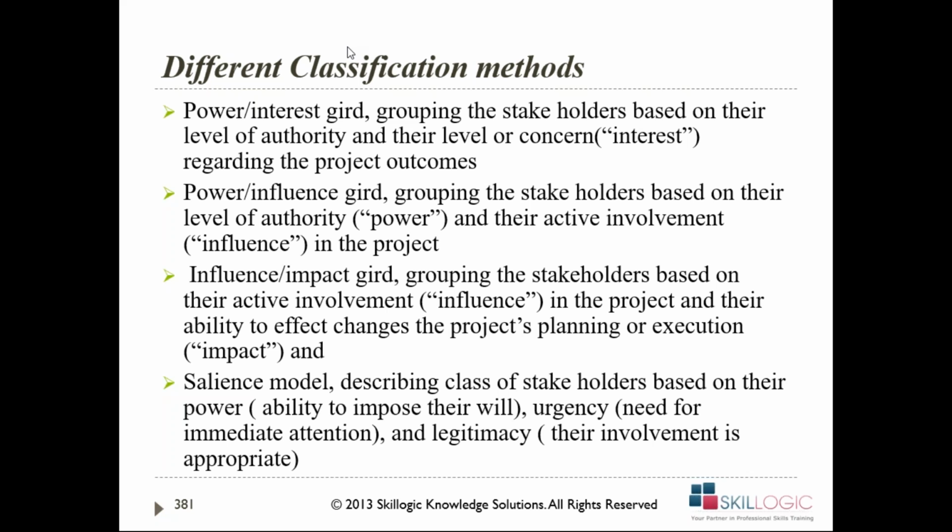And eventually, what happened? I think they did not realize the impact that the chief minister of that state could have on their project. Eventually, she used it for her own personal advantage. She used it for her own political advantage. Now, that power that she had needed to be identified in the beginning. What is the power that the person has? What is the influence that the person can have on a project? Manage them very closely, understand the expectations and meet those expectations.